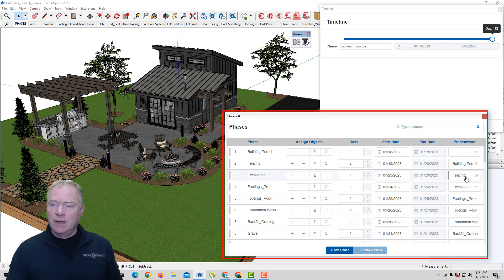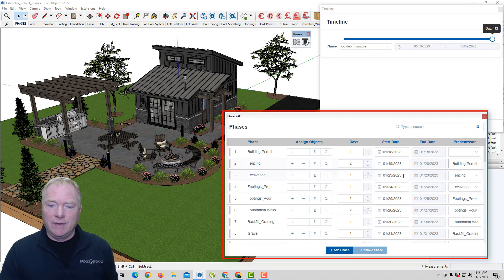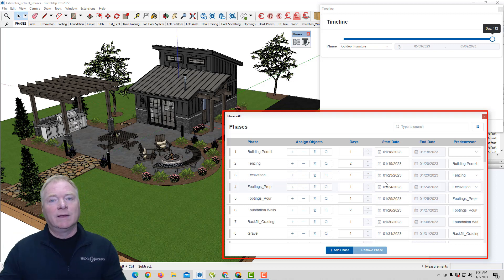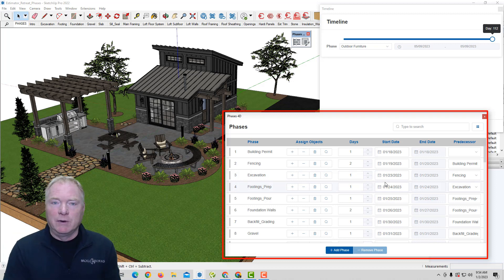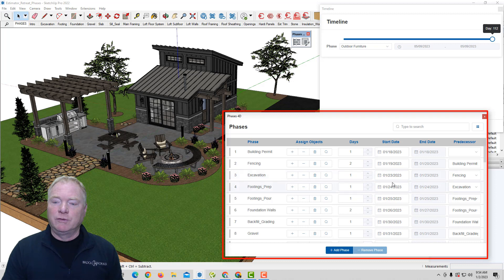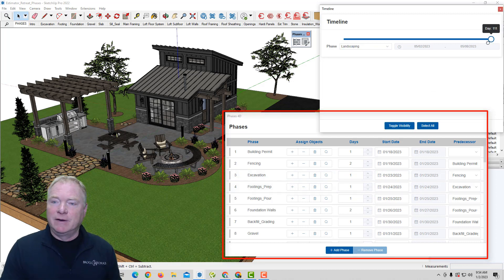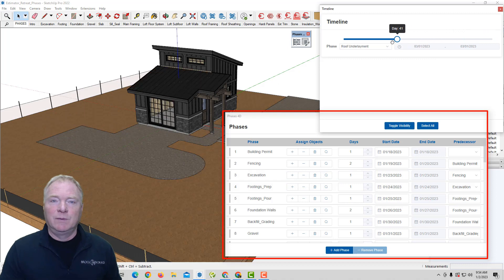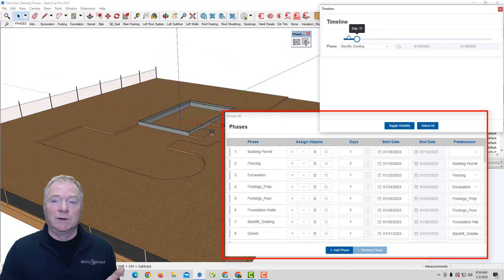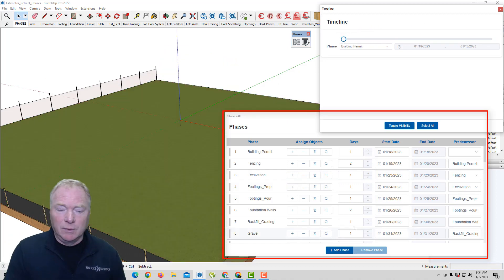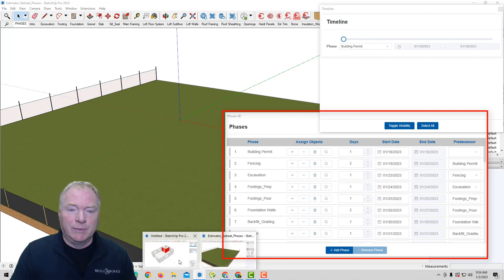For example, in our case here, excavation can't happen until we get a building permit, that sort of thing. Footings can't happen until you do excavation. So one before the other, that's a predecessor. So if you're familiar with scheduling, that's how that works. So you can build your schedule out along with your predecessors. And then simply drag the fader over time to see the project, which is really cool. And so we'll break it down into a more simple example.